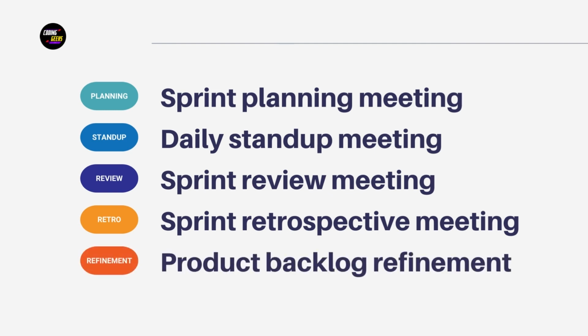Product backlog refinement meetings occur between sprints, usually just once per interim, but you could always schedule another if needed. This meeting is your chance to add clarifying details, establish deliverables, and prioritize the tasks in your backlog. A thorough product backlog refinement meeting makes your life easier.